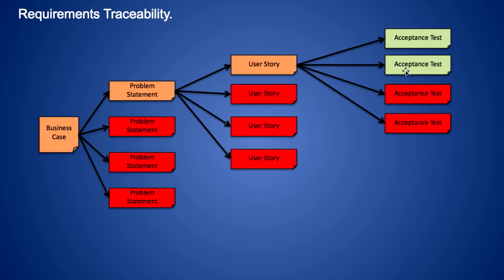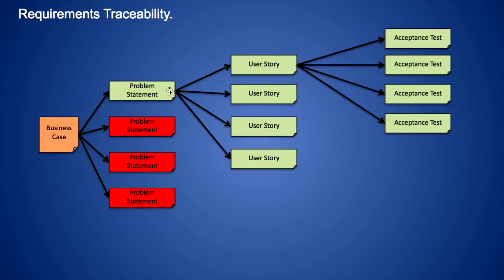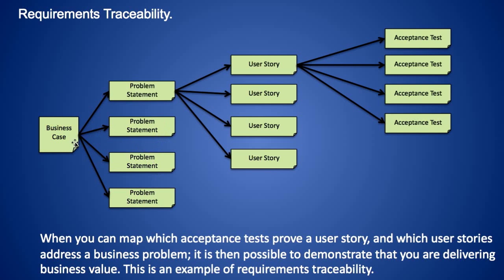As these acceptance tests begin to pass, the user story associated with those tests is considered complete. As all the user stories become complete, the problem has been resolved. As the problems are all resolved, the business case has been satisfied. This mapping of acceptance tests which prove user stories, and which user stories address which specific business problem, demonstrates that you're delivering the business value described in the business case. This is an example of requirements traceability.